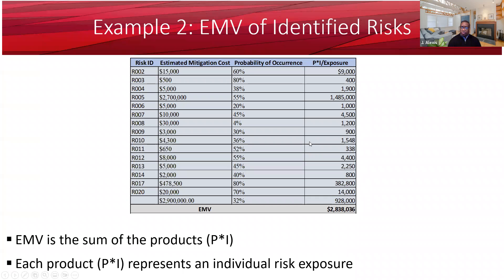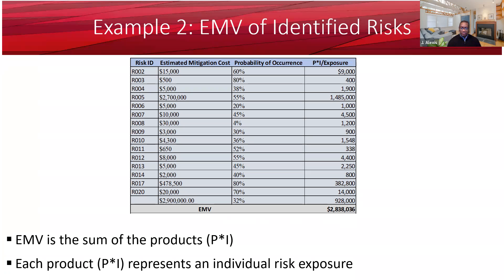Let's say you identify risks in your project, and after qualitative risk analysis, you decide to quantify some of the risks. You determine the estimated mitigation costs and associated probability. You multiply each estimated mitigation cost by its probability to get the product P×R, and then you sum them up. EMV here is the sum: 2.8 million. EMV is the sum of the products — that's what you need to remember. Each product represents an individual risk exposure.